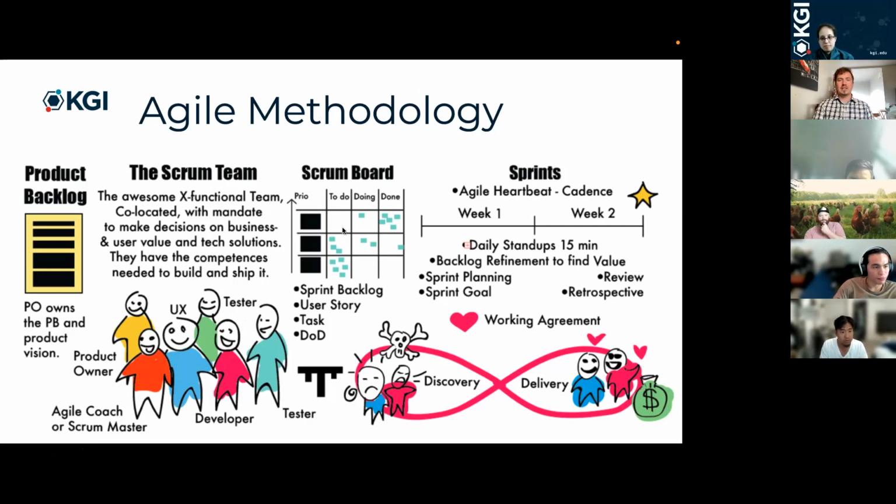Scrum board. This is something that you'll see in the Google folder that I shared with you all. It's a very effective way to keep track of who's doing what, when, and whether we are on track. This is sort of your equivalent of a Gantt chart, but it doesn't really need to be a Gantt chart, whereas Waterfall would be heavily dependent on a Gantt chart, because that project is so complex from getting from day one of your project to a whole year later, or whatever that time frame might be, that you need this complex timeline and Gantt chart with different roles and responsibilities.